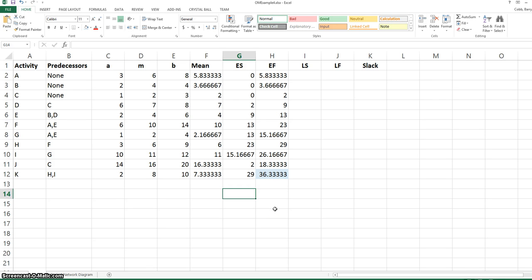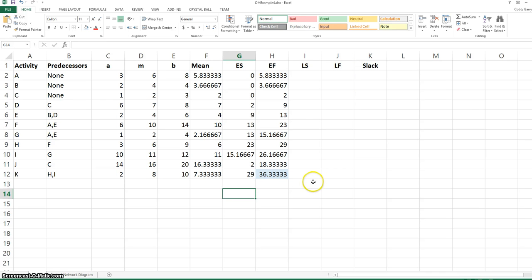We can see now that our estimate of the project completion time is 36.33. This completes the forward pass through the network. We'll now make the backwards pass through the network and start with the latest finish time. Latest finish times are interpreted as the latest an activity can finish and still complete the entire project in 36.33 days.